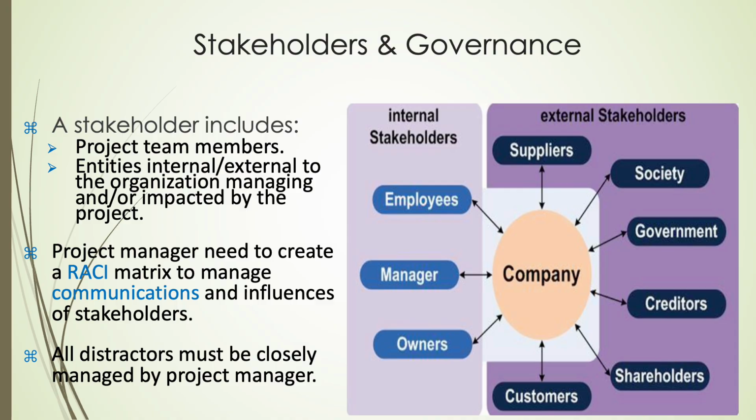Beyond initial classification, continuous monitoring of stakeholder engagement is critical for maintaining momentum and managing change. Engagement levels, tracked across 5 stages from unaware to leading, highlight both current and target states to inform intervention strategies. The process of monitoring uses structured inputs like the stakeholder register, techniques such as decision-making analysis, and outputs like change requests and updates to management plans.